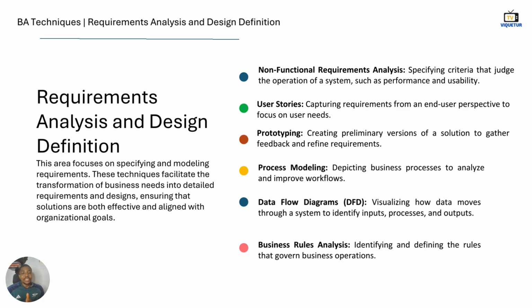So basically, when you've gathered requirements, you break your requirements into different features and you break your features into different user stories. It is the user story documentation that you then send to your developers, and that is what they will use to understand the solution better, right? There's no such thing as more better. That's a tautology. Pardon me.